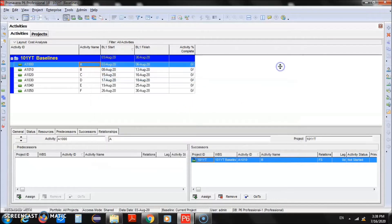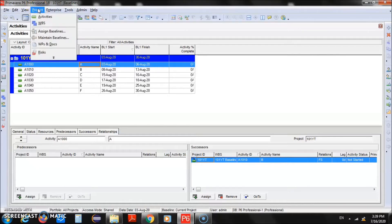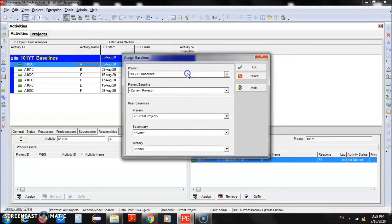Currently there are no baselines available, so simply click the Add button and go with the first option, click OK. Now we have our first baseline B1. We'll close this window. What has happened is that the current project has been copied as a baseline named B1. We now have two projects: the current project on screen and a copy saved as B1. To connect the baseline with the current plan, go to the Project menu and click Assign Baseline.